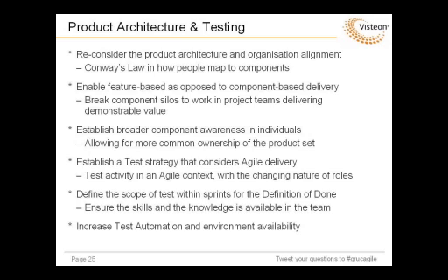Well, absolutely not, and making sure that quality assurance, verification and validation steps in delivery come into the definition of done for the teams, but also make sure that we put in place those post-sprint further test activities and automation to allow that all to be done as effectively as possible. And getting the test community heavily engaged in what's going on is going to be a major success.